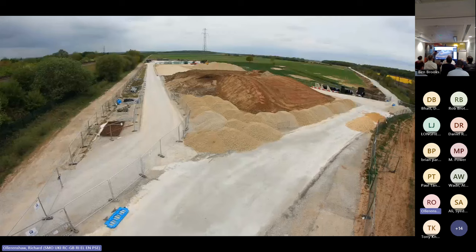So we're coming to the end of the construction video. Construction was substantially complete a year later. So January 2023 was when we were able to start pre-commissioning. So within a year was the overall construction time.